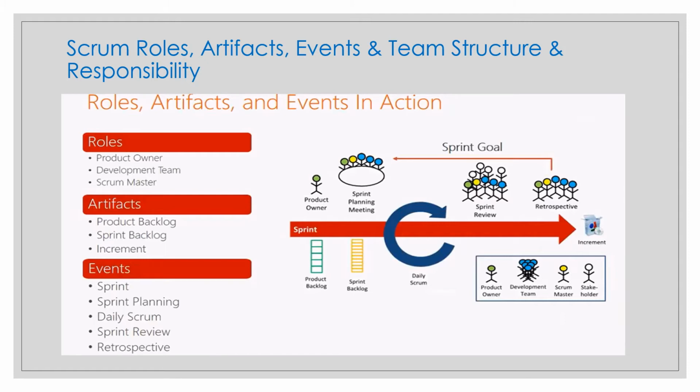So there they will measure the outcome. The product owner is one person, not a committee. The product owner may represent the needs of many stakeholders in the product backlog, and those wanting to change the product backlog can do so by talking to the product owner or convincing the product owner. So changes can be made anytime, but they will be done with the product owner, and he is the person. Even if a stakeholder wants any changes, that should come to the product owner.